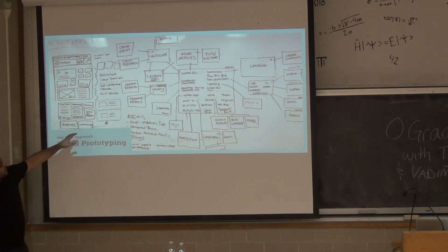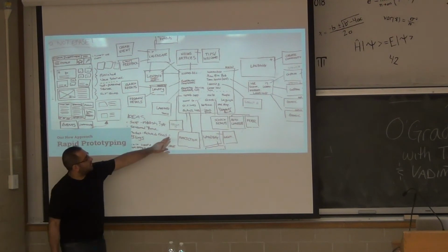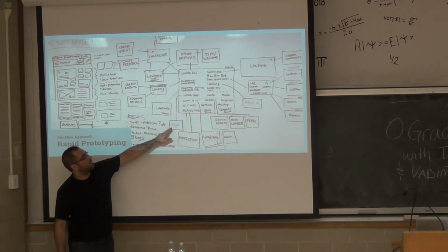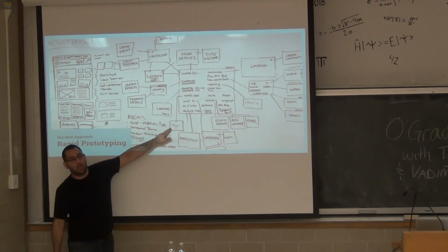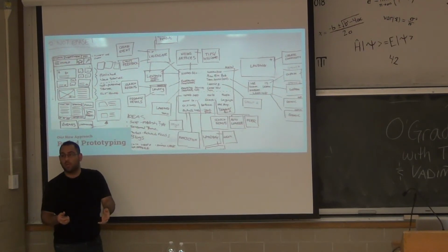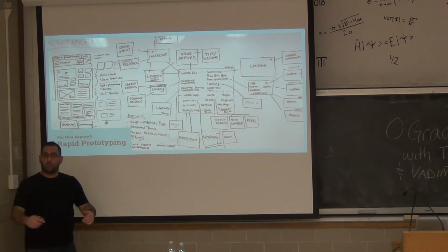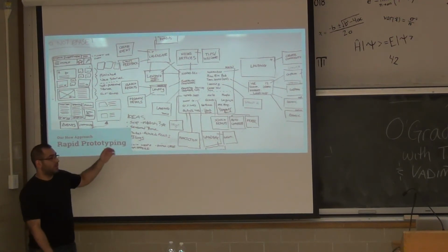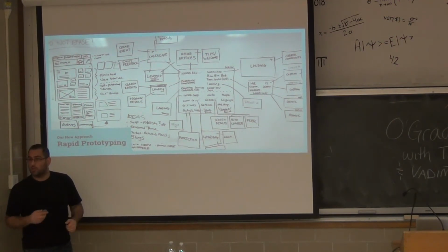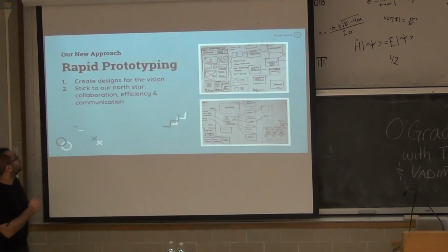And the other part that we also found interesting is that I really can't overemphasize how important it is to have your sprint out there in the open, because the amount of times you speak to other stakeholders and it's like, I thought we were going to do this in sprint 5. No, it's up there, it's been up there for 2 weeks, you can read it. So that really helped from a communication perspective because there weren't multiple documents going around, just a single source of truth. Pretty much whiteboard's the best part.